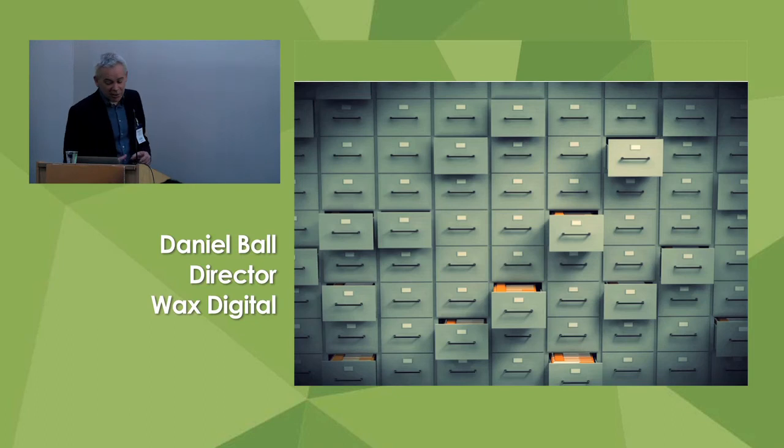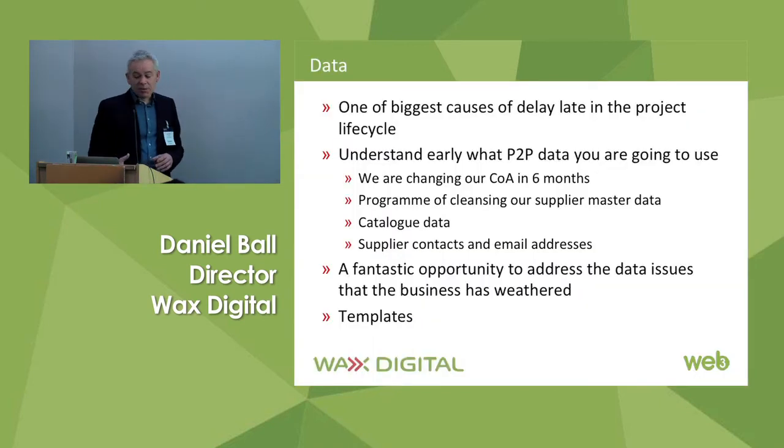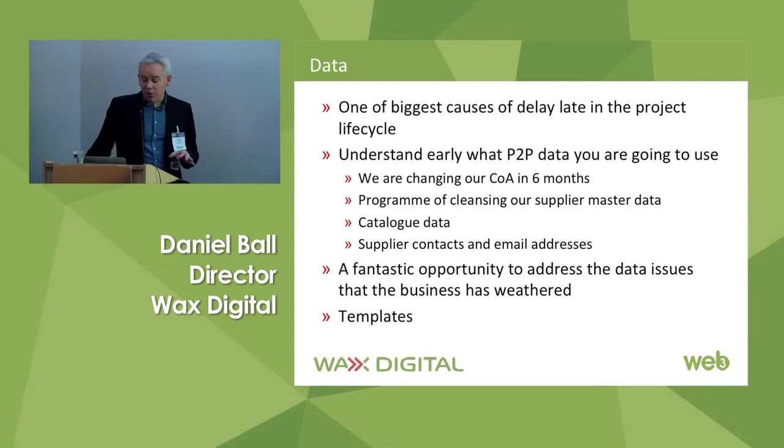And talking of which, that brings up my number 7 on the countdown, or the count up. This one's a bit in the weeds, but again, it is really important. Poor data can be an absolute nightmare in a P2P implementation. And a big problem is that it often doesn't have a significant impact until right at the end of the process. So, if you've been through weeks, even months of workshopping, specification, implementation, testing,